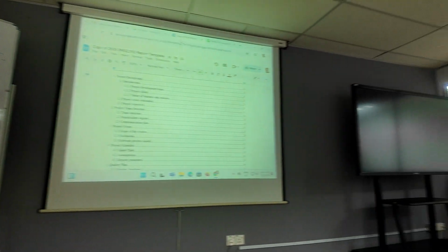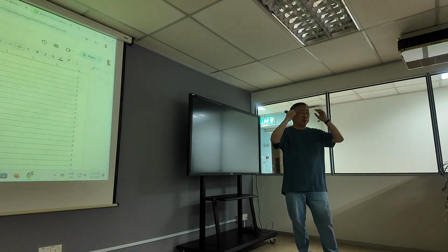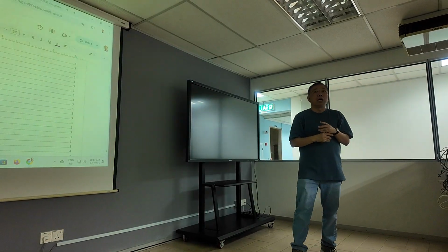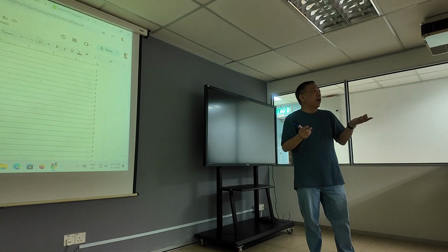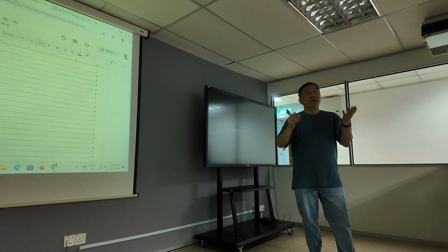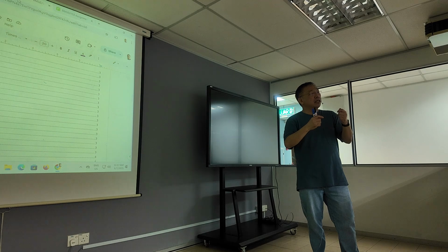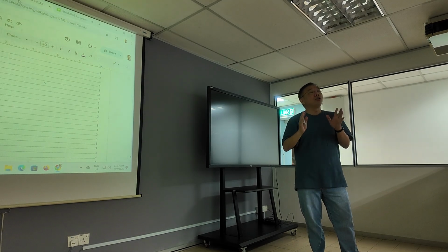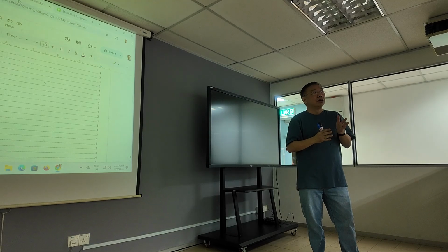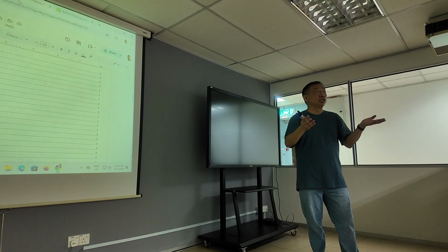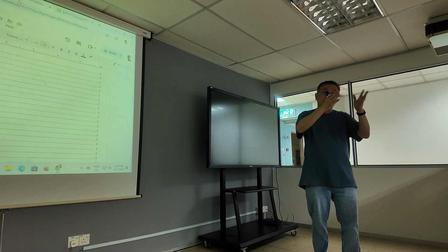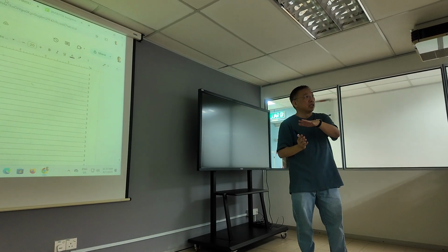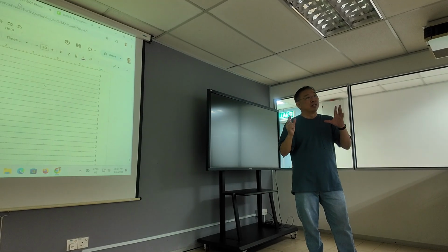Another example of an exclusion could be, I'm just giving you examples, you can Google and research a lot more about what things are left out, hardware. Maybe the responsibility of buying and sourcing the hardware is the customer's, the client's. So your project does not include purchase of hardware. If you're developing a system, maybe your exclusion is that the client has to source and purchase the hardware before the project starts. You need to put that in exclusions as well.